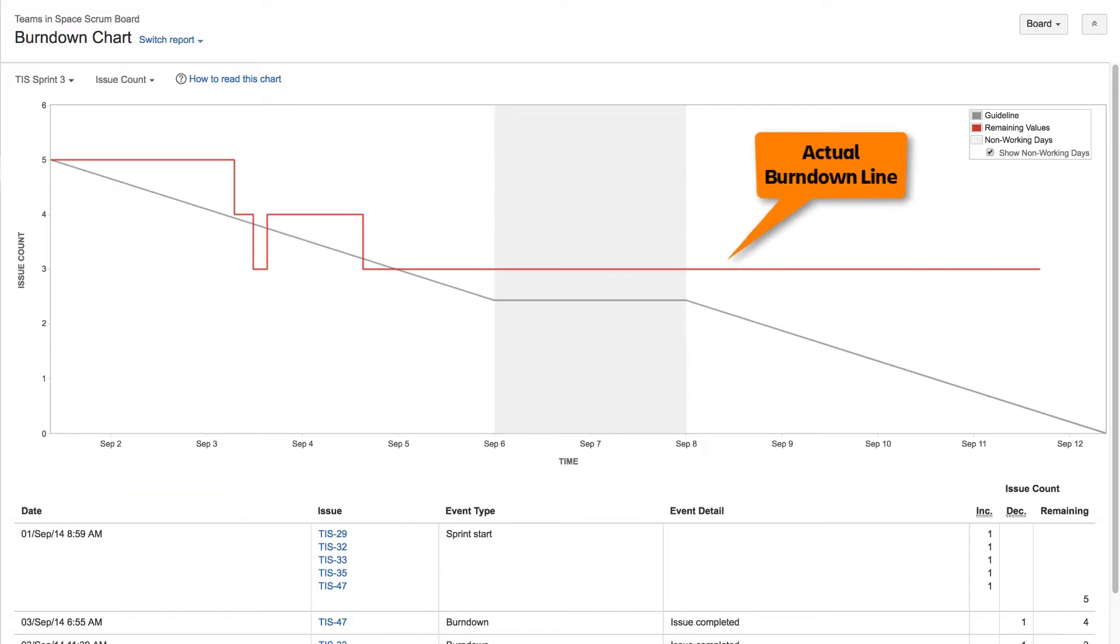The red line shows the actual progress of the sprint as issues are completed, and indicates the issues or story points remaining in the sprint. The burndown chart is board-specific, and will only include issues that match your board's saved filter.